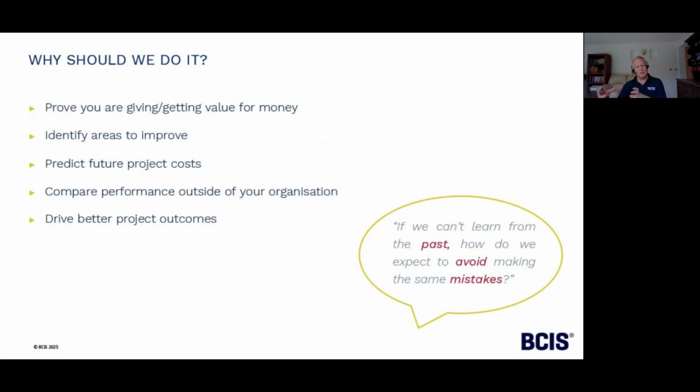Benchmarking, if you do it right, is also a good predictor of future project costs. And by that, I mean as you're looking at other comparable projects, you can see things that happen in those other projects that are likely to also happen with yours. So it's a great way of informing risks and other things that I'm sure we'll talk about in the conversation later on.